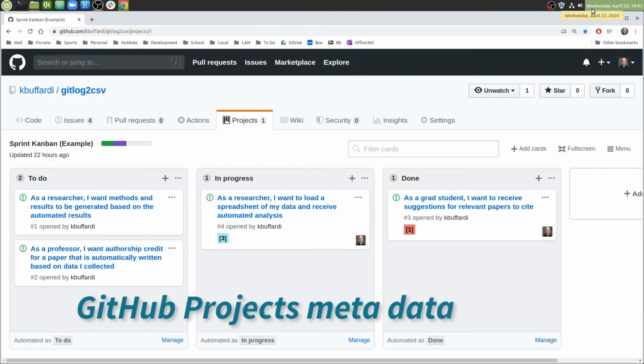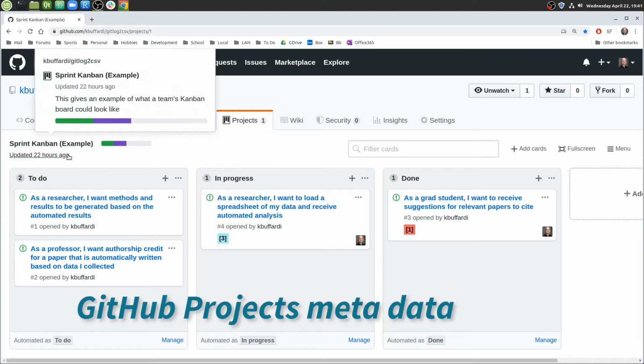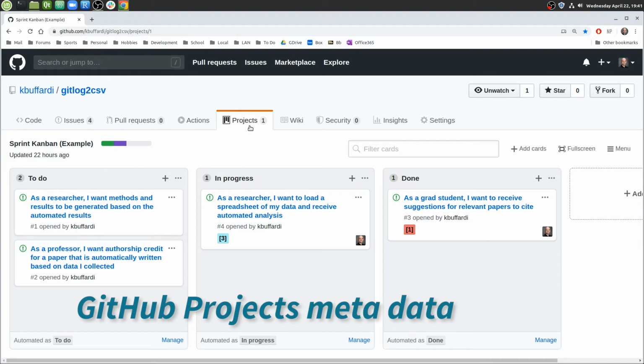Another common tool adopted in software engineering courses are project management boards, which help you keep track of progress within your project. Here you can see an example Kanban board that is supported by GitHub Projects. A Kanban board includes the functionality that's still going to be developed, as well as the status from to do, in progress, finally to done. Now, each card you'll see represents a user story. In other words, functionality that's described in terms of what the user needs.